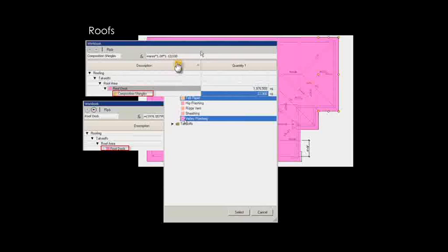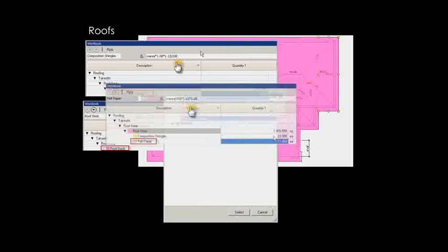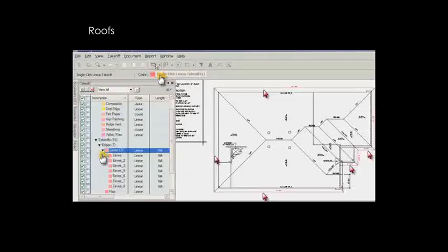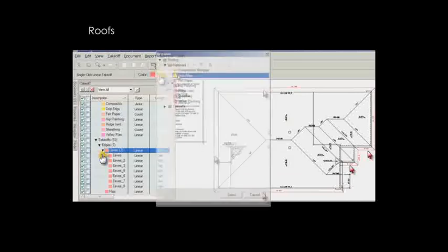which is pretty much that assembly, drawing it if it's 2D. If it's 3D, picking the elements or searching by type, and in the end, you just get a result of quantification and mapping. That mapping just assigns the assembly type item to the element that you draw or pick from a model. And finally, in the end, what it gives you is just a list of quantities, like I said, for everything. As long as it's itemized, then you can see it and list it.